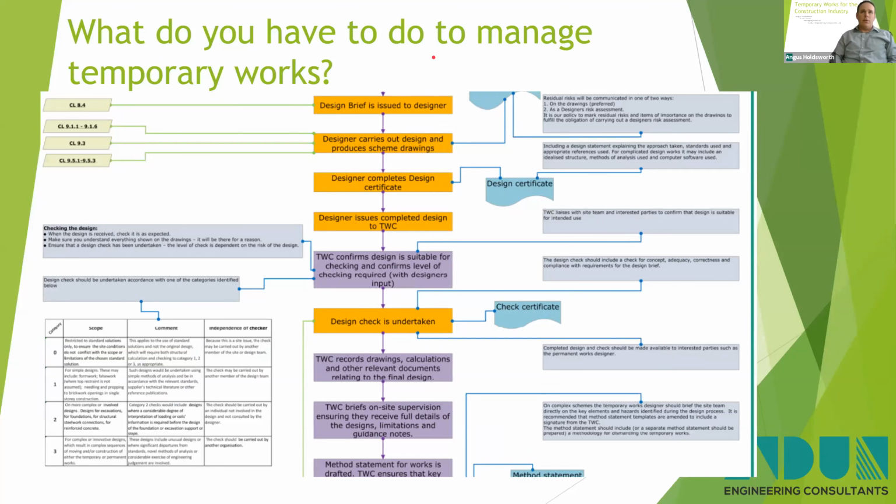But we do work with many clients who send in a brief where they've already decided what they want, and then it's just a case of putting some numbers to it for them. Both ways work, but often you can get a more innovative design if you give us a bit more freedom. So once a design brief is issued, we then carry on with the design, produce the scheme drawings, and we'll provide design certificates, and we'll issue the package back to the TWC for review.